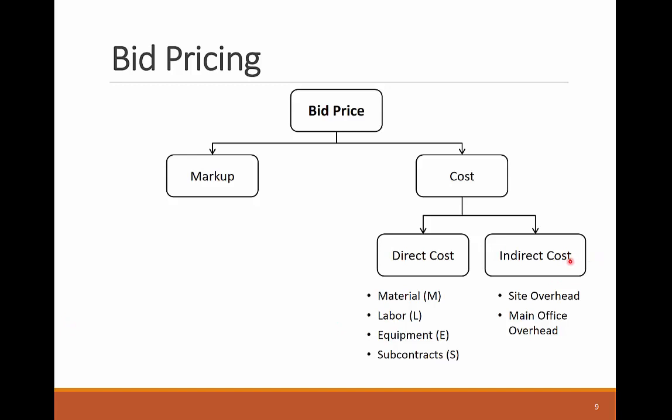The indirect cost is any cost that cannot be directly associated to a work package in your project, and it includes site and office overhead items. Site overhead includes general site conditions and supervision, like project managers, project engineers, and superintendents, as well as temporary facilities like office trailers, dumpsters, and mobile toilets. Office overhead includes all the staff and facility costs of the main office, where functions like business leadership, administration, estimating, human resource management, and marketing are performed to support the company's different projects.